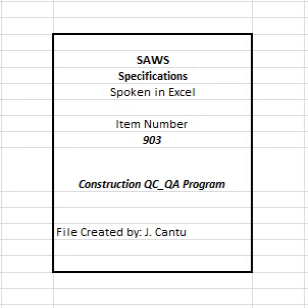3. Name and qualifications of competent person, and alternate. B. Definable construction features. 1. List of definable features/items, identified by SAWS specification numbers. 2. Schedule of values for all definable features shall be submitted and approved prior to submittal of first pay request. C. General administrative procedures. 1. Identify all responsible personnel, contractor authorized representatives to sign contract documents, pay requests, change orders, etc. 2. Identify all construction forms/procedures required, in accordance with SAWS Construction Phase Procedures Guidance Manual. 3. Identify all SAWS personnel, engineer, etc. responsible for the review or acceptance of submittals and construction activities.